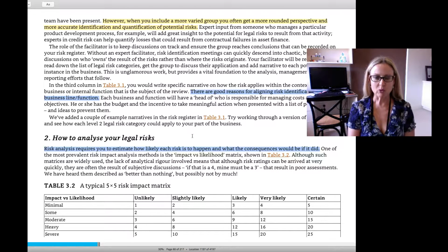So if you look at, for example, risk number 2, pretty much up the top in the middle there, you can see risk number 2 has been assessed as slightly likely, and it's really only of a minimal nature. So you're going to be treating a risk like that very differently to something like risk number 25 down on the bottom right there. It's pretty much certain that this risk is going to eventuate, and if it does, the consequences would be fairly dire. So that kind of risk is obviously a red flag and something that you would want to prioritise in the next step, which is evaluation.